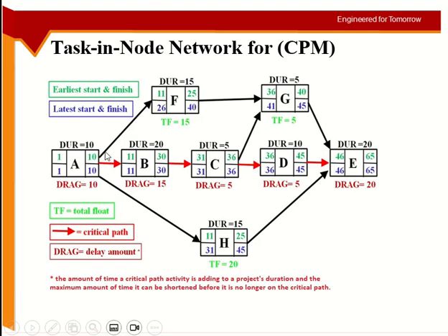In the traditional critical path method, we don't consider any chance that an activity may have multiple possible durations, which is a more realistic idea. Realistically, your concreting may finish in 5 days, but there is a chance it can finish in 6 days, or in 4 days.